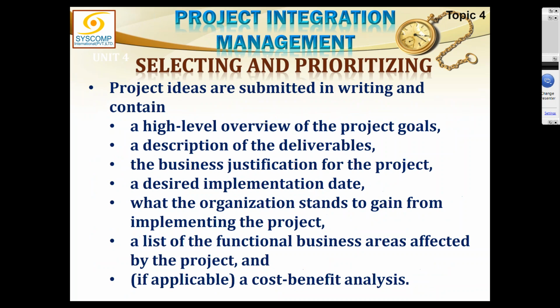Project ideas are submitted in writing and contain what? A high-level overview of the project goals, description of the deliverables, business justification, desired implementation date, what the organization stands to gain from implementing the project, a list of functional business areas affected by the project, and a cost-benefit analysis, as I said earlier.